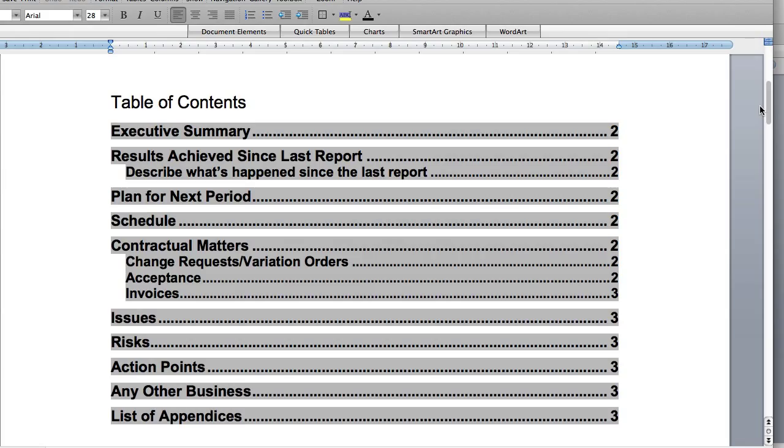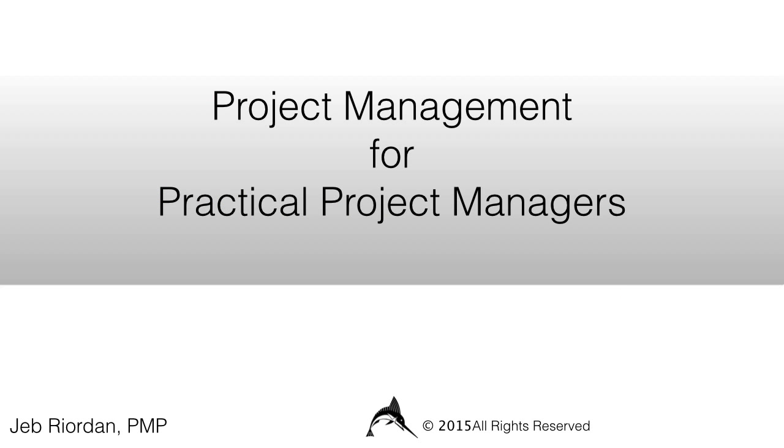And one last note on reporting status. If the project is being done for an external customer, then you will have 2 separate status reports, one for the customer, one for internal consumption, which will probably contain some sensitive information. Don't get them mixed up.